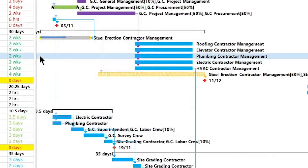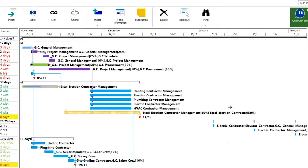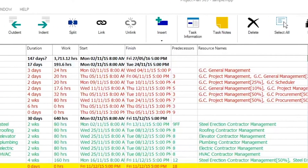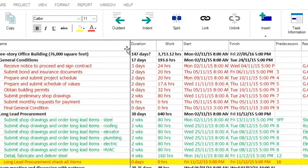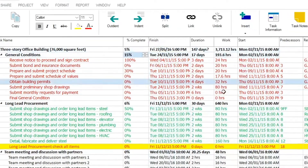Let's also change the column order in our printed document. For our document, we will need Task Name, Percent Complete, and Finish Date. Please note that the print functionality always prints the current view. Let's move the Percent Complete and Finish Date columns near Task Names and make them visible in the Gantt chart view.